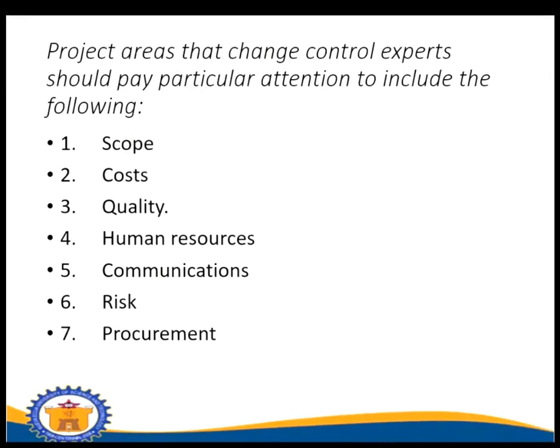Project areas that change control experts should pay particular attention to include the following. Number one is scope. Change requests must be evaluated to determine how they will affect the project scope. Schedule. Change requests must be assessed to determine how they will alter the project schedule.